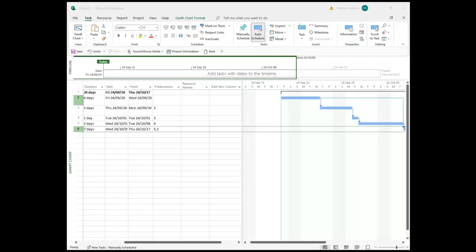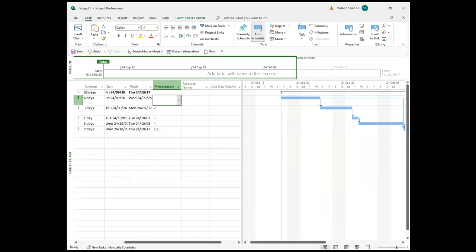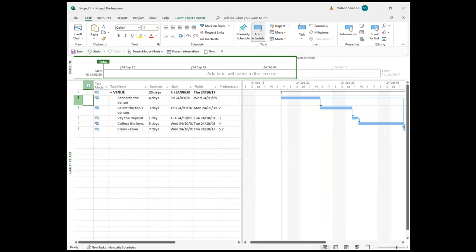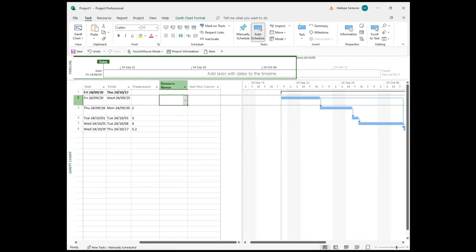The next thing that I want us to talk about is how to add the resources. Specifically here, I'm going to add only the human resources, the team members, because for us to complete a deliverable, we need to engage on activities like you can see here. These are our activities. So we can allocate activities to specific team members. That's why we need to populate this column called human resource.